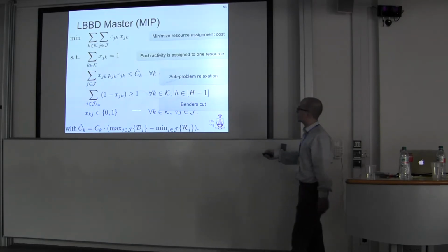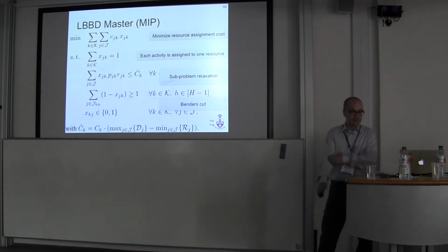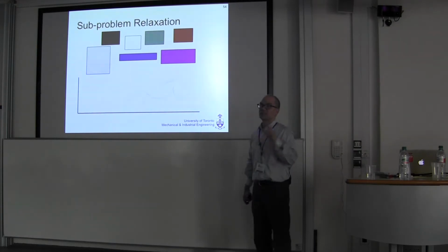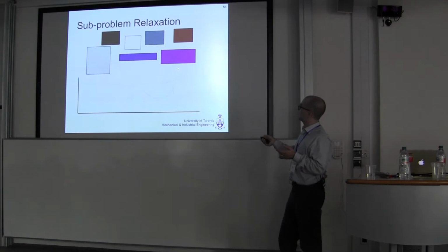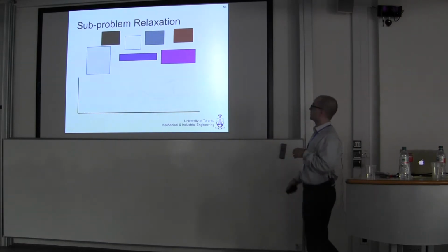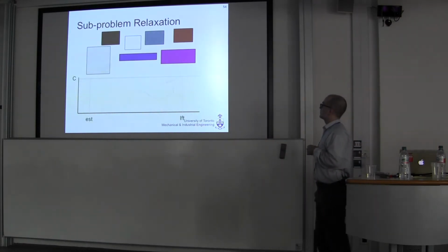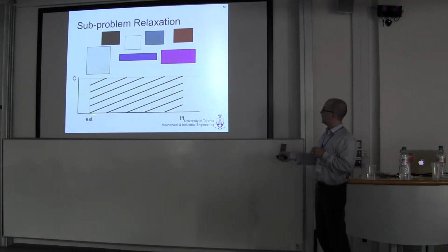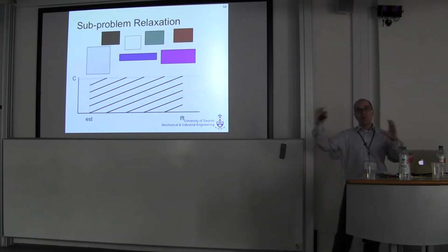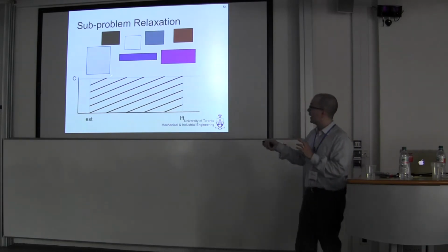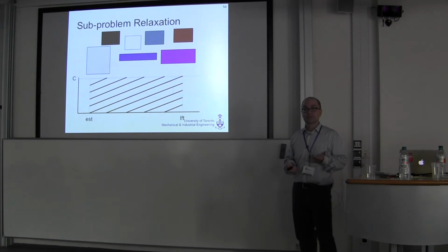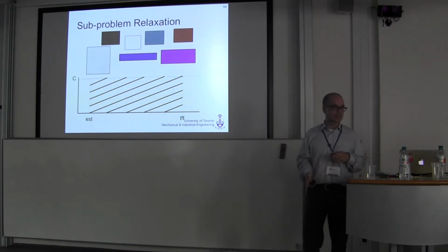And this is what's called a Benders cut, which we're going to talk about in a couple slides. So, the subproblem relaxation is what I just hand-waving told you about. If I take the sum of these areas, all these guys are assigned to the same resource. Well, I know that this time window times this capacity, this area, must be greater than or equal to the sum of these guys. Otherwise, there's no way I'm going to be able to pack them on. It's a relaxation, this might be true, and I still might not have a schedule, okay, but it is a linear relaxation here.